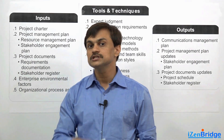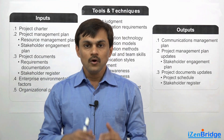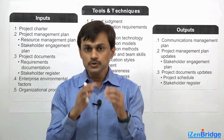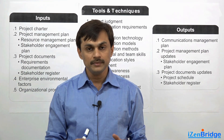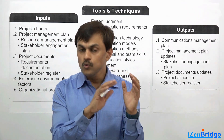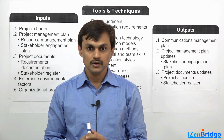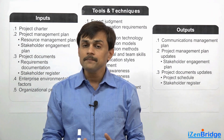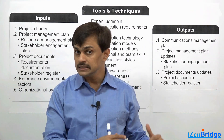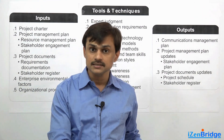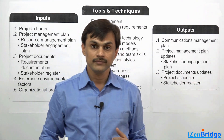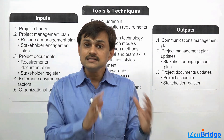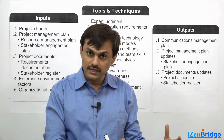Let's understand the utility of the communication management plan. On a frequent basis — every week, every month — you need to be clear what information needs to be sent to which stakeholders. You should know who is interested in what type of information, and you should have a plan with format, technology, method, and a responsible person identified for doing this work. You should also have an agreement between stakeholders, the project manager, and the project team about how you are going to communicate and send information.